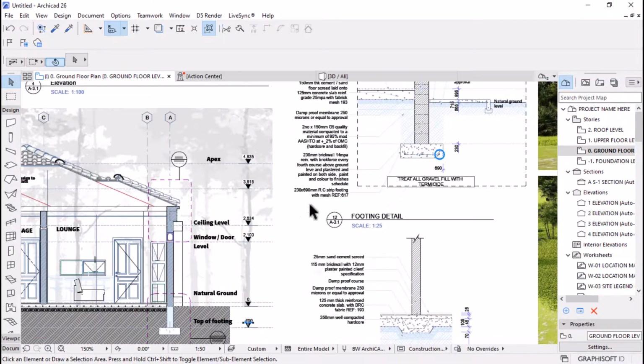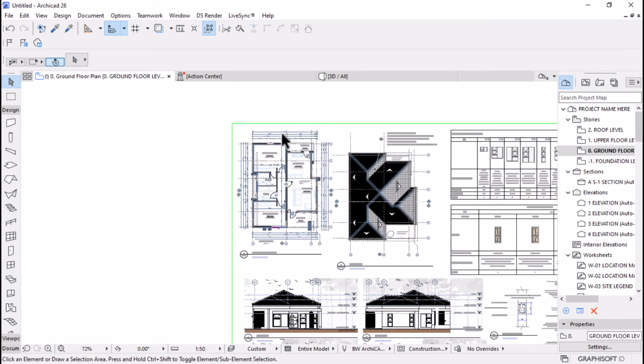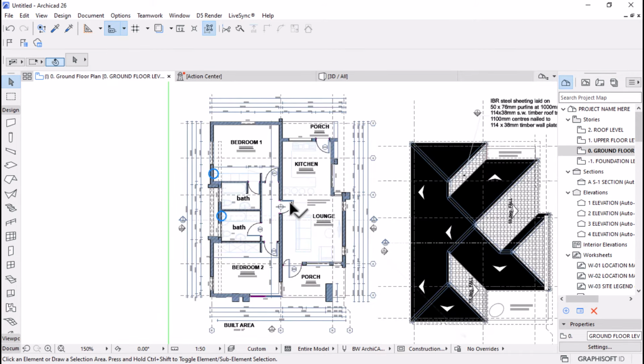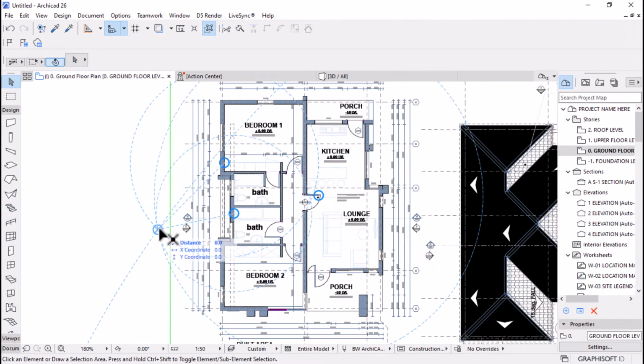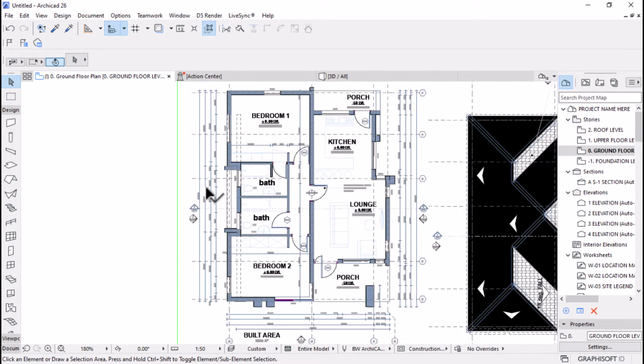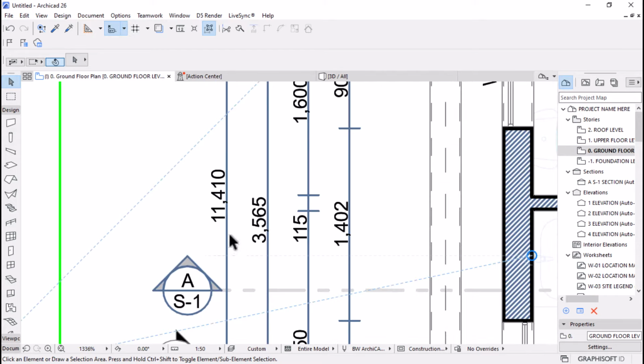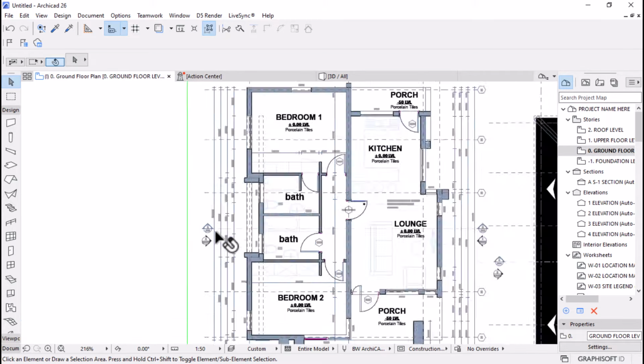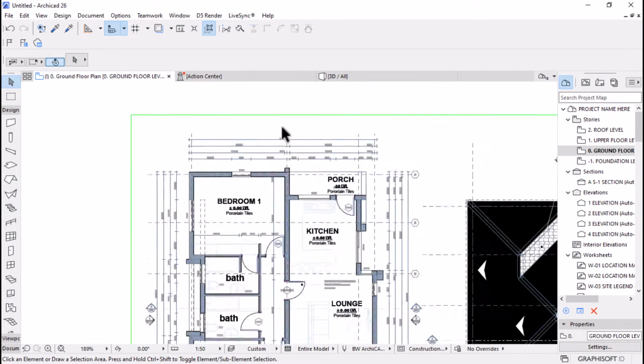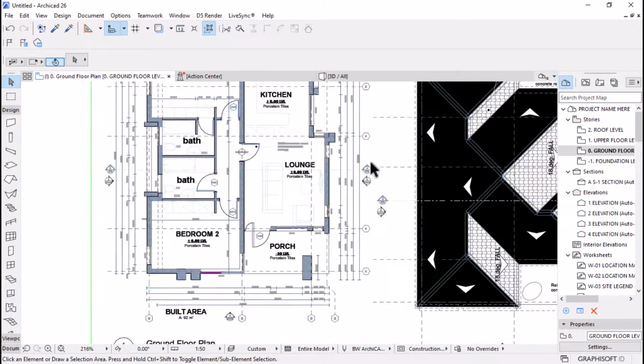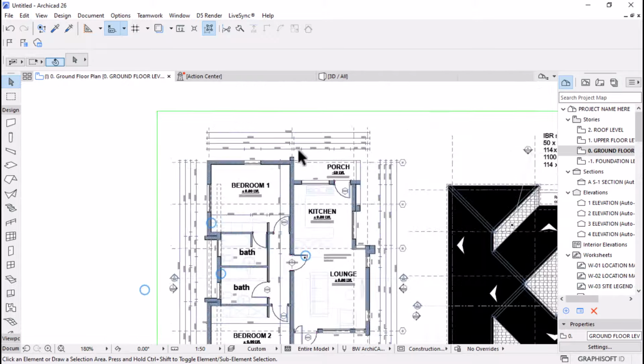Okay, so in this case you'd find the structural walls. That's where only the foundation is going to be cast. So we have the footprint walls, which I'll treat separately. We have this wall that is 11.4 meters long, and then we have this one which is 8.8, and the same for this one and that one. We have the fifth one which is in the center. These are the five walls for brickwork foundation.